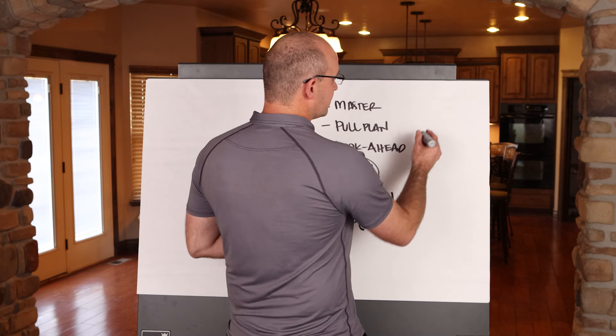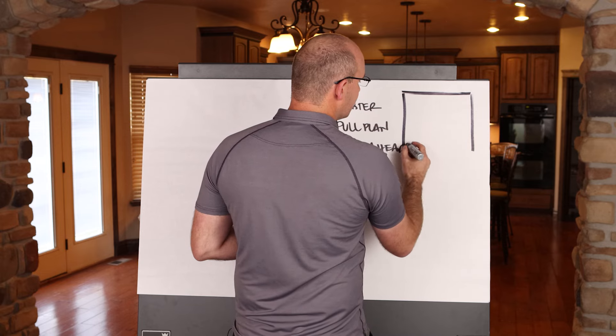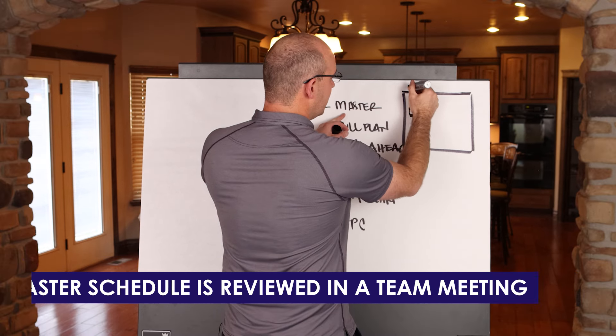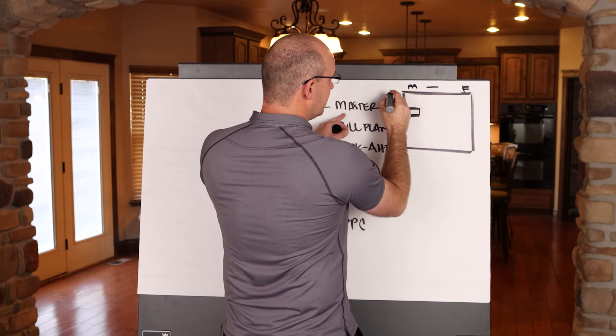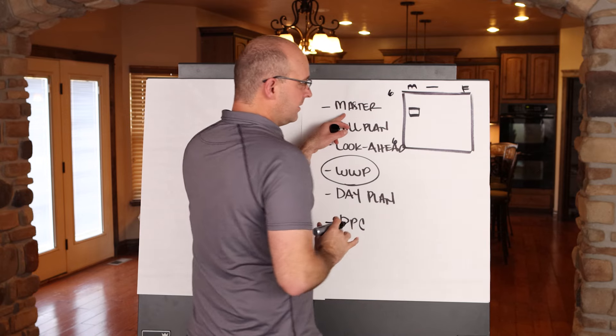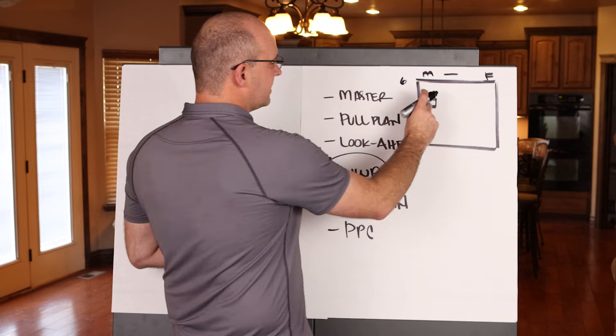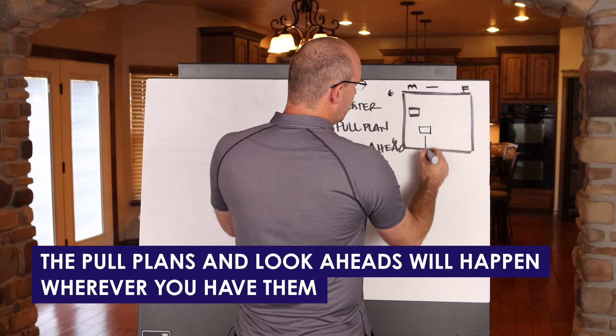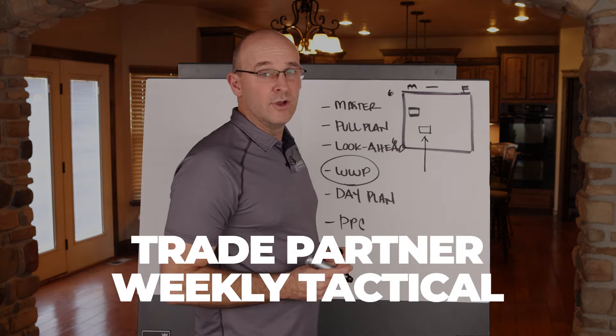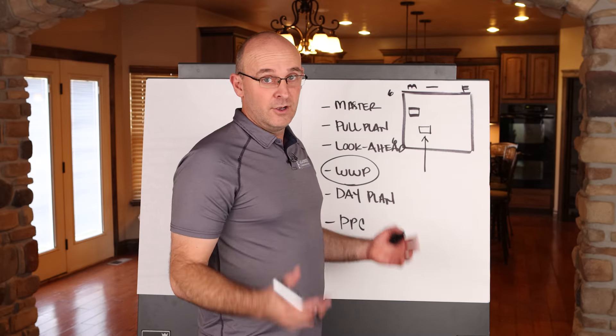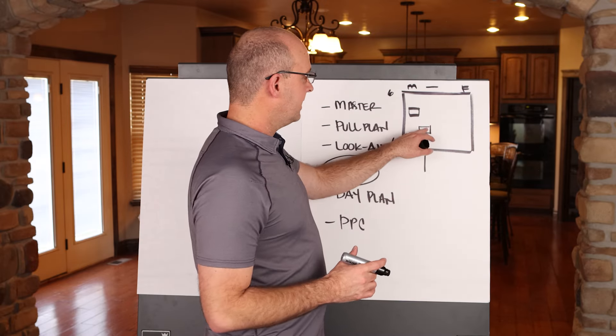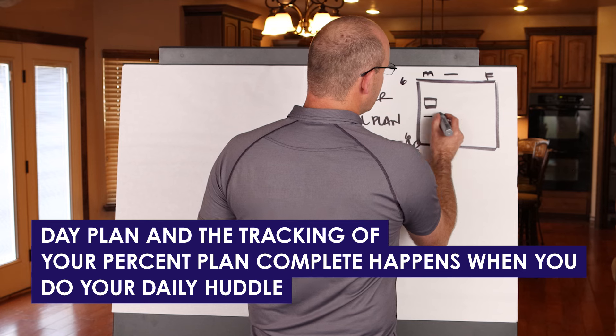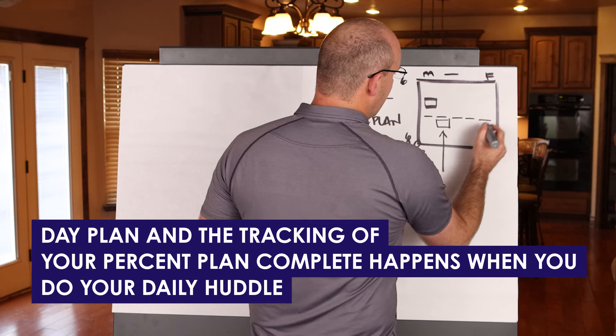So in the meeting structure, typically at a bare minimum, if you look at Monday through Friday, typically the master schedule is reviewed in a team meeting. I'm just going to do M through F here. And let's do six o'clock to six o'clock at night, so 6 a.m. to 6 p.m. The master schedule will typically be discussed in the team meeting. The pull plans and look-aheads will happen wherever you have them in your trade partner weekly tactical, or your Last Planner meeting, or your weekly work planning meeting, or your trade meeting.